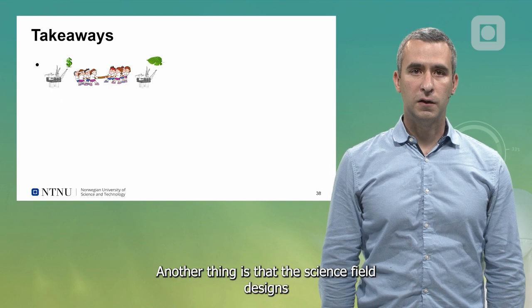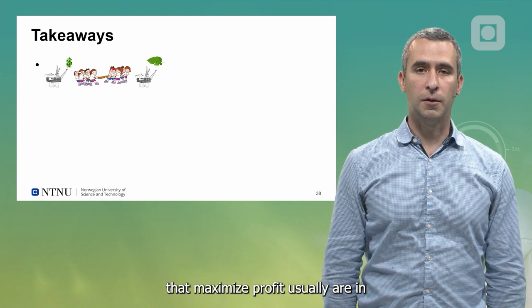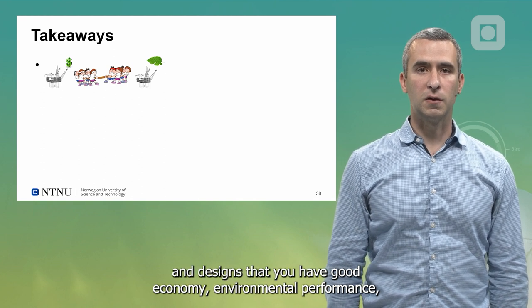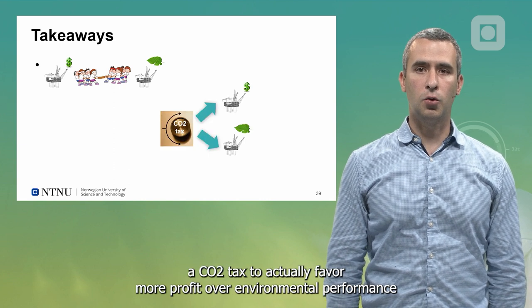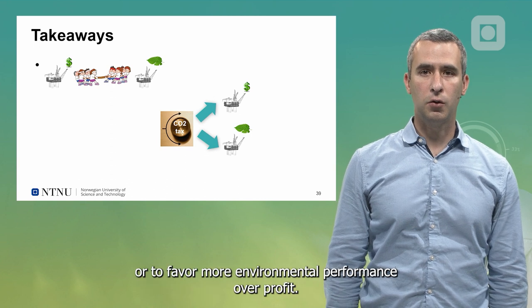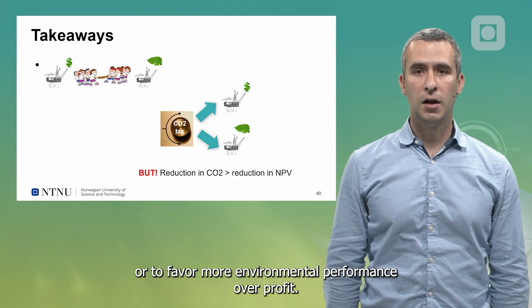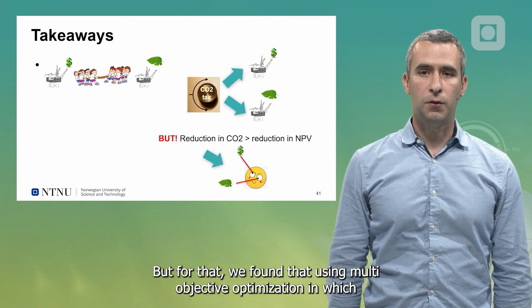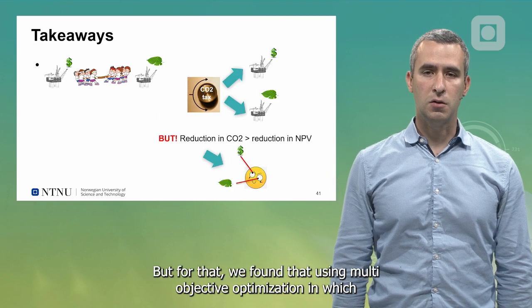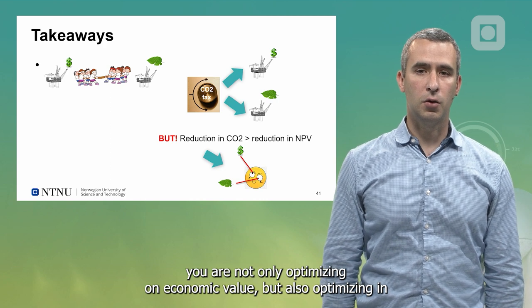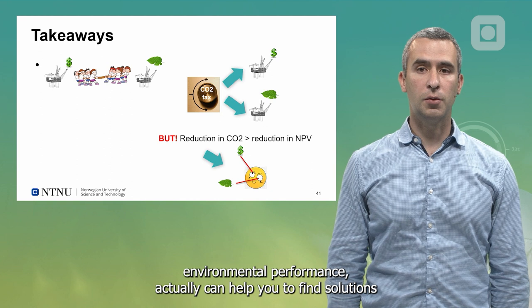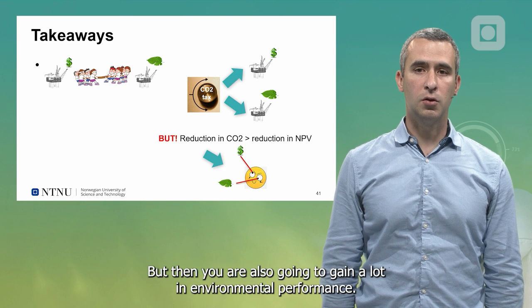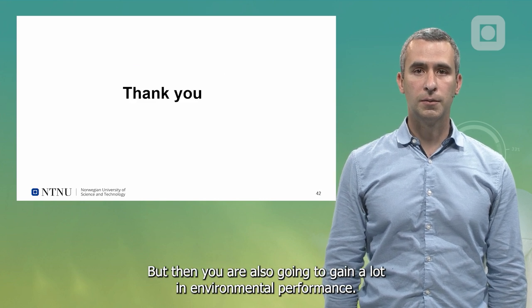Another thing is that field designs that maximize profit usually have a trade-off between those designs and designs that have good environmental performance. You can use the CO2 tax to favor more profit over environmental performance or to favor more environmental performance over profit. But usually, if you want to reduce CO2, you also have to sacrifice some NPV. For that, we found that using multi-objective optimization in which you are not only optimizing on economic value but also optimizing environmental performance can help you find solutions where you sacrifice a bit of project value but gain a lot in environmental performance.